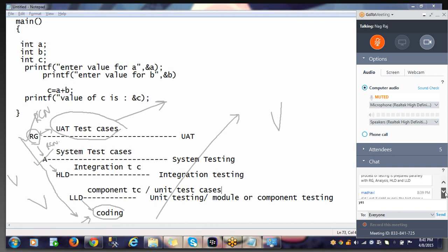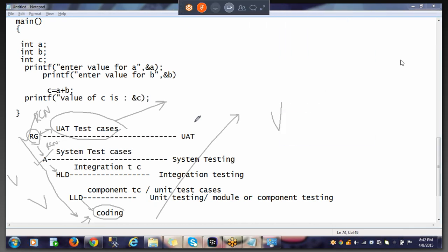All right. So this is about your V model. This is an advantage. This is overcoming the disadvantage of your waterfall model, where testing is initiated right from your requirement phase, where you're trying to come up with a point called early testing, which will reduce the cost of fixing the defects. Now again, I say this particular model is not that advantageous in the real world. Why? Because the user still has to wait until the end to see the application.